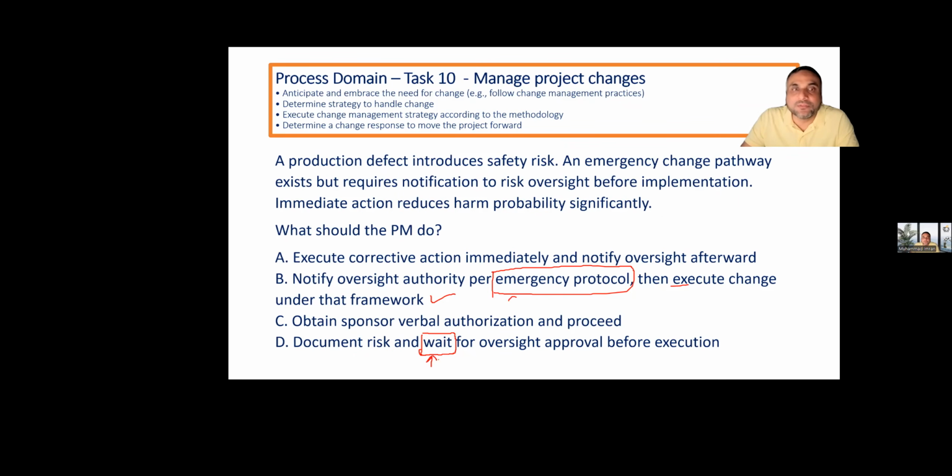Emergency protocol means the change management plan or change control system is defined: who can approve what type of change, and what will happen if these types of things happen. So you have already established the governance. Emergency protocol is already defined.